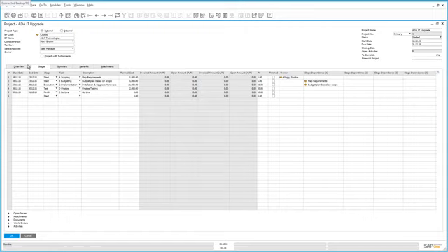So under the Stages tab, we have a number of predefined stages. These stages for our project are start, execution, test and finish. And all of these stages can be defined according to your project requirements. For this project, we kick off the project with the start stage. And the task associated with this stage is the scoping task.